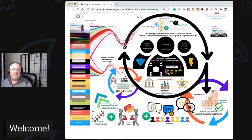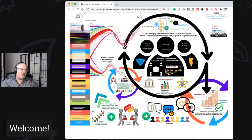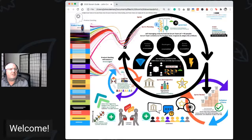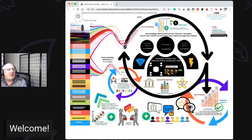Another major change in the 2020 guide: the product goal is now a commitment to the product backlog — we're striving to achieve some outcomes and impact, trying to be clear about what we're trying to achieve. Every sprint, the sprint goal iterates towards the product goal. The sprint goal is a commitment to the sprint backlog and is now actually included in the sprint backlog.